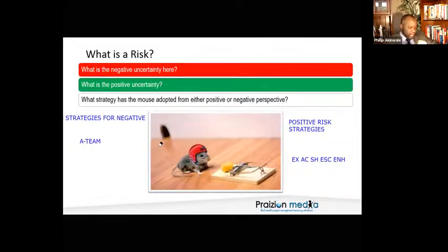Exploit, an example of exploiting at the overall project level would include addition of high benefit elements of scope to the project to add value or benefits to stakeholders. Alternatively, the risk thresholds for the project may be modified within the agreement of key stakeholders in order to embrace the opportunity. So I would like you, without reading the PMBOK guide to you, please go through the other examples of transfer or share, examples of mitigate or enhance, and examples of accept. This is going to enrich your exam experience.